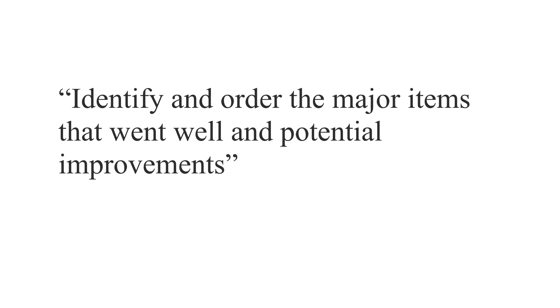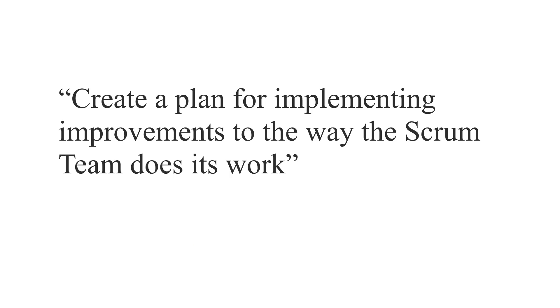Identify and order the major items that went well and potential improvements. And thirdly, create a plan for implementing improvements to the way the Scrum team does its work. Create a plan — that's the adapt part of inspect and adapt. Talking's great, but what we need is to take action.